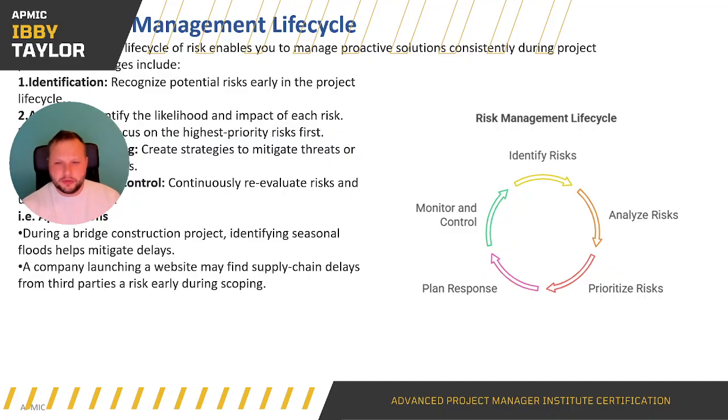So, the risk management lifecycle. This is a lifecycle which is going to enable you to manage proactively and consistently during the project. Like I mentioned, this is for the entirety of the project. You always want to be looking at your risks, managing your risks, making sure that you understand them, and constantly seeing if you can identify any new ones as the project progresses. In the management lifecycle, you identify the risks, you analyse them, you prioritise them, you then plan your response, respond to them, and then you monitor and control, and you just go around that cycle again and again and again.